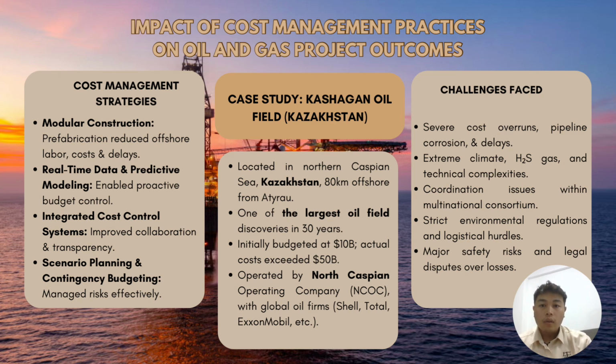So, I will start with our topic, which is the impact of cost management practice on oil and gas project accounts. For our case study, it is the Kashagan oil field, which is in Kazakhstan, located in the northern Caspian Sea, 80 km offshore from Atyrau, one of the largest oil field discoveries in 30 years. The initial budget was 10 billion pounds, but the actual cost exceeded 50 billion pounds. It is operated by North Caspian.